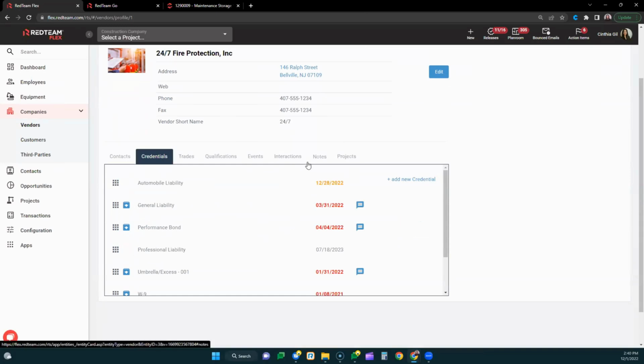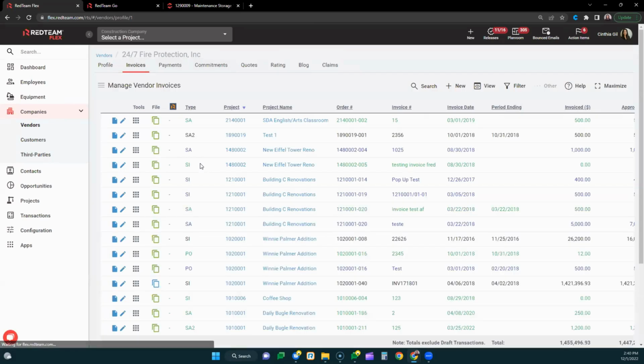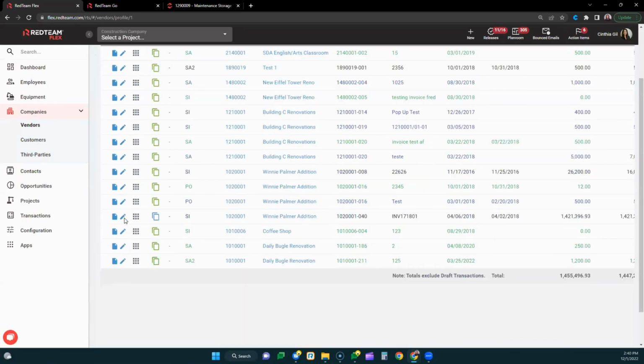We can see which subcontractors have these credentials up to date when we're sending out a subcontract. So even before we send it out, we can require those items. Or we could also require those items when we are receiving those invoices and we are in the approval process. And I will show you what an invoice workflow looks like. Let me click on this one.